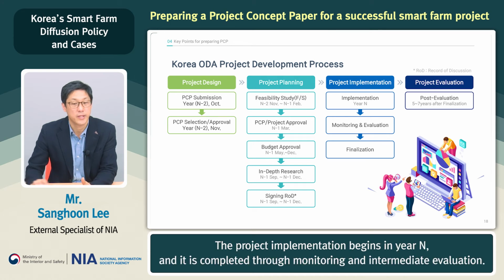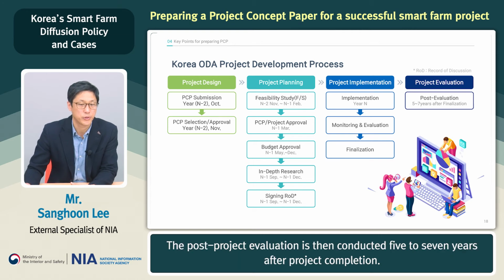The project implementation begins in year N, and then it is completed through monitoring and intermediate evaluation. The post-project evaluation is then conducted 5 to 7 years after the project completion.